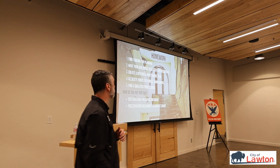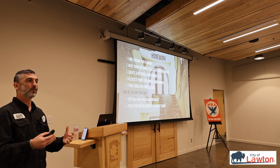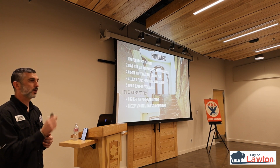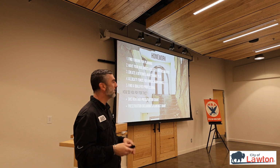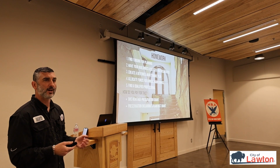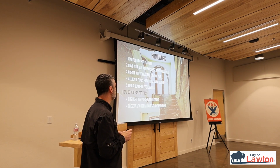and start working towards that annual maintenance, because annual maintenance at 2 to 4% of the building's value is a little bit that gets to be squeezed into a line item of your annual budget. You may not get a $1 million project squeezed into the budget, but a $10,000, $5,000 maintenance line item, absolutely, you can squeeze that in most instances.